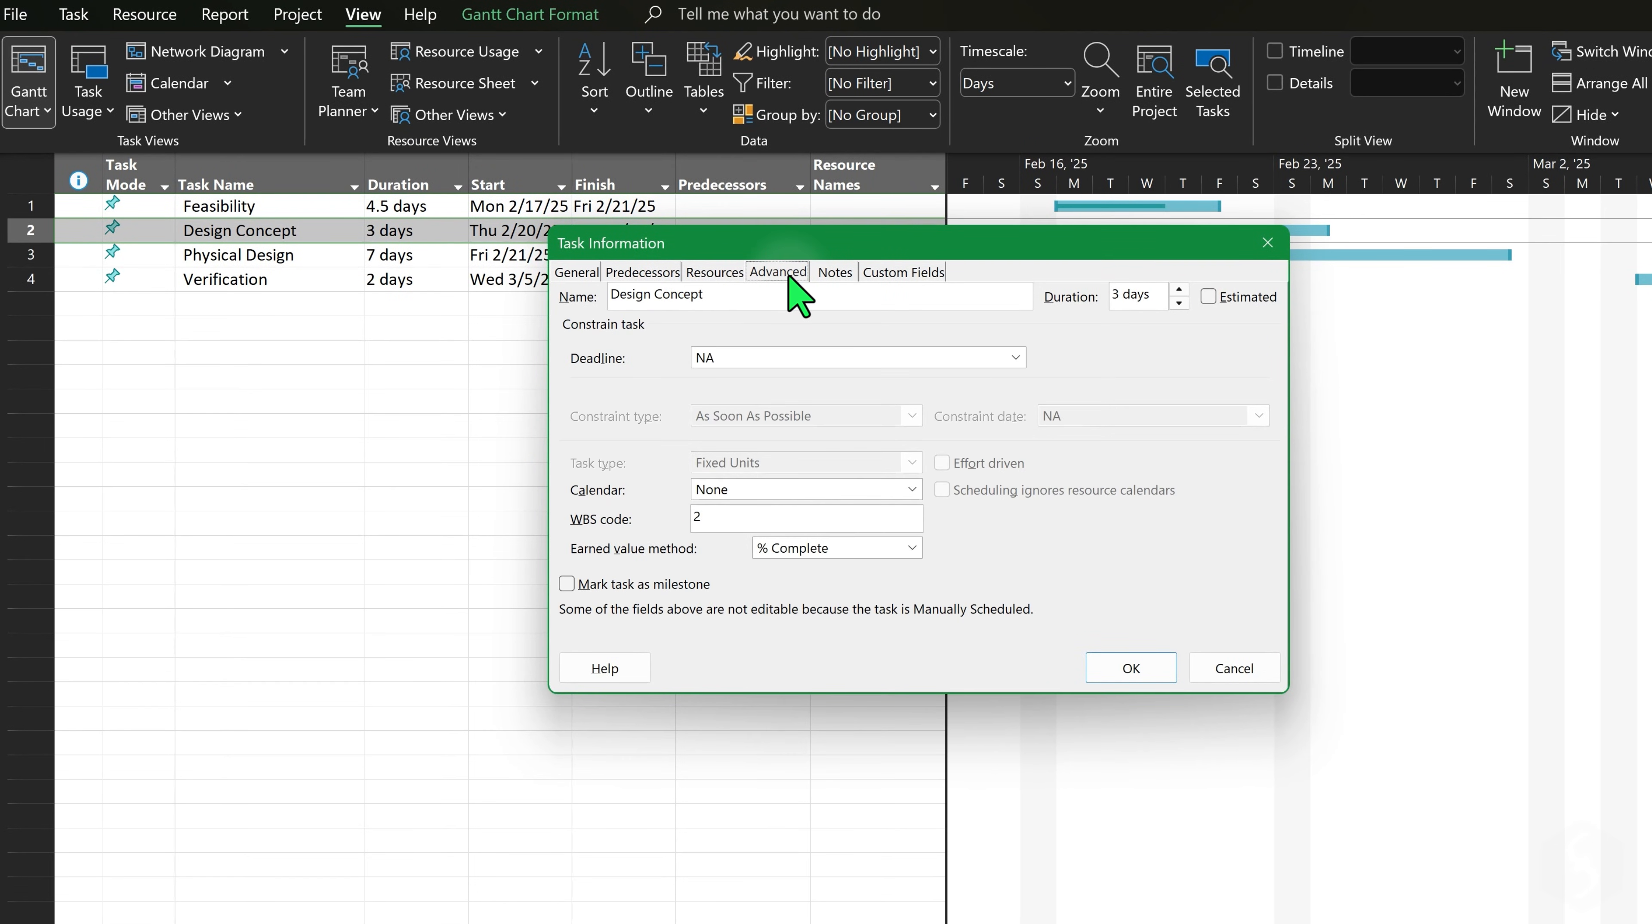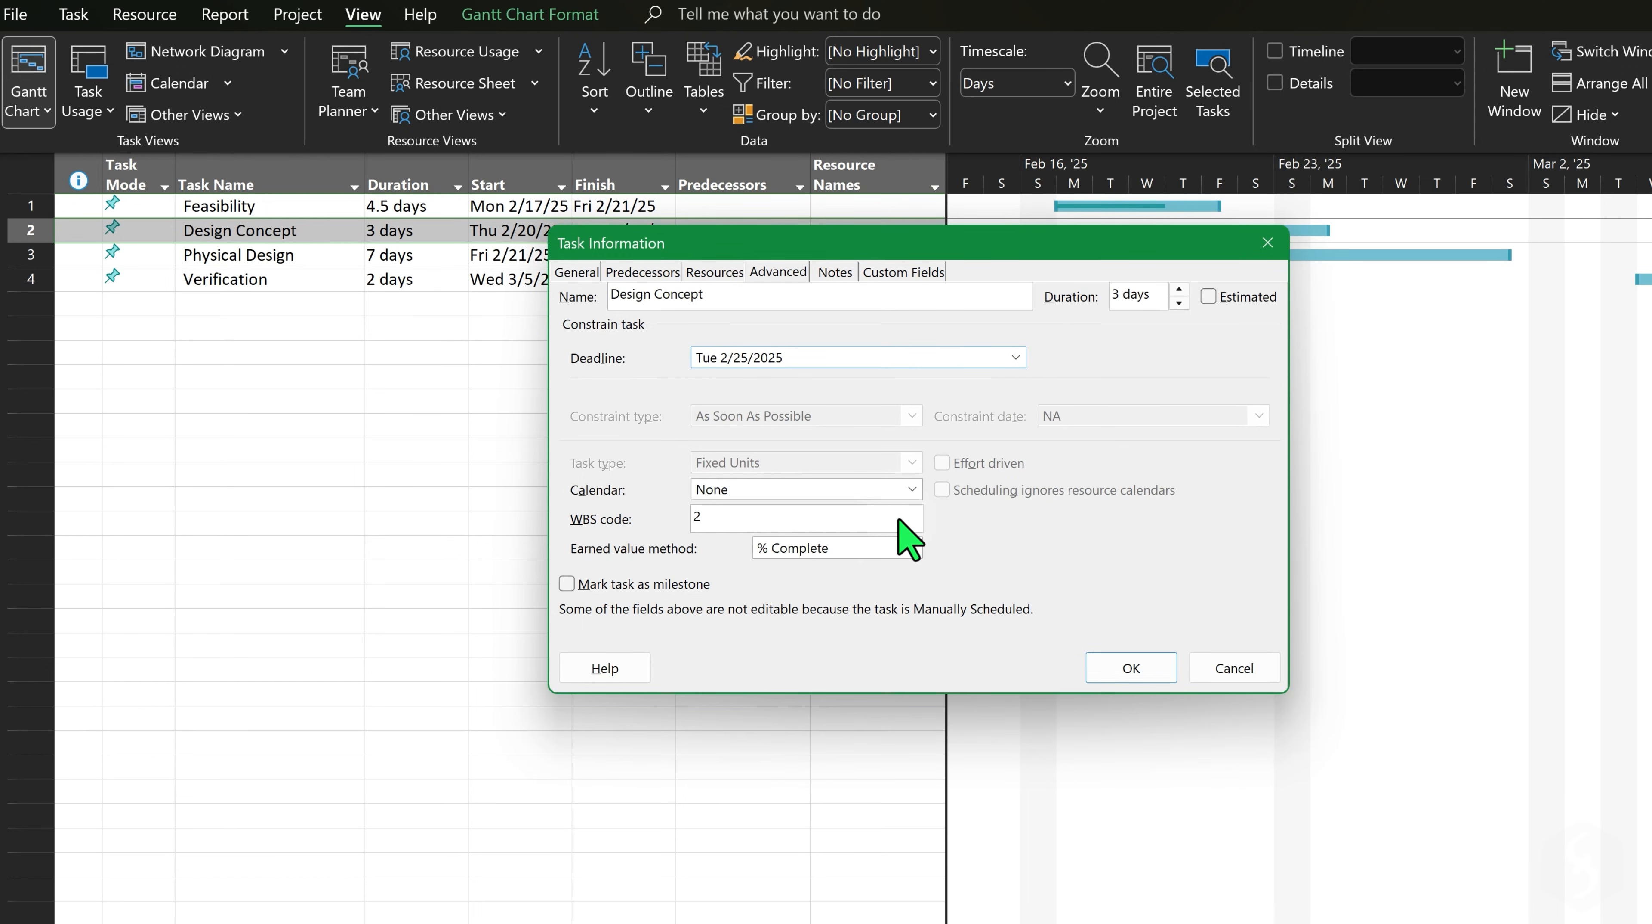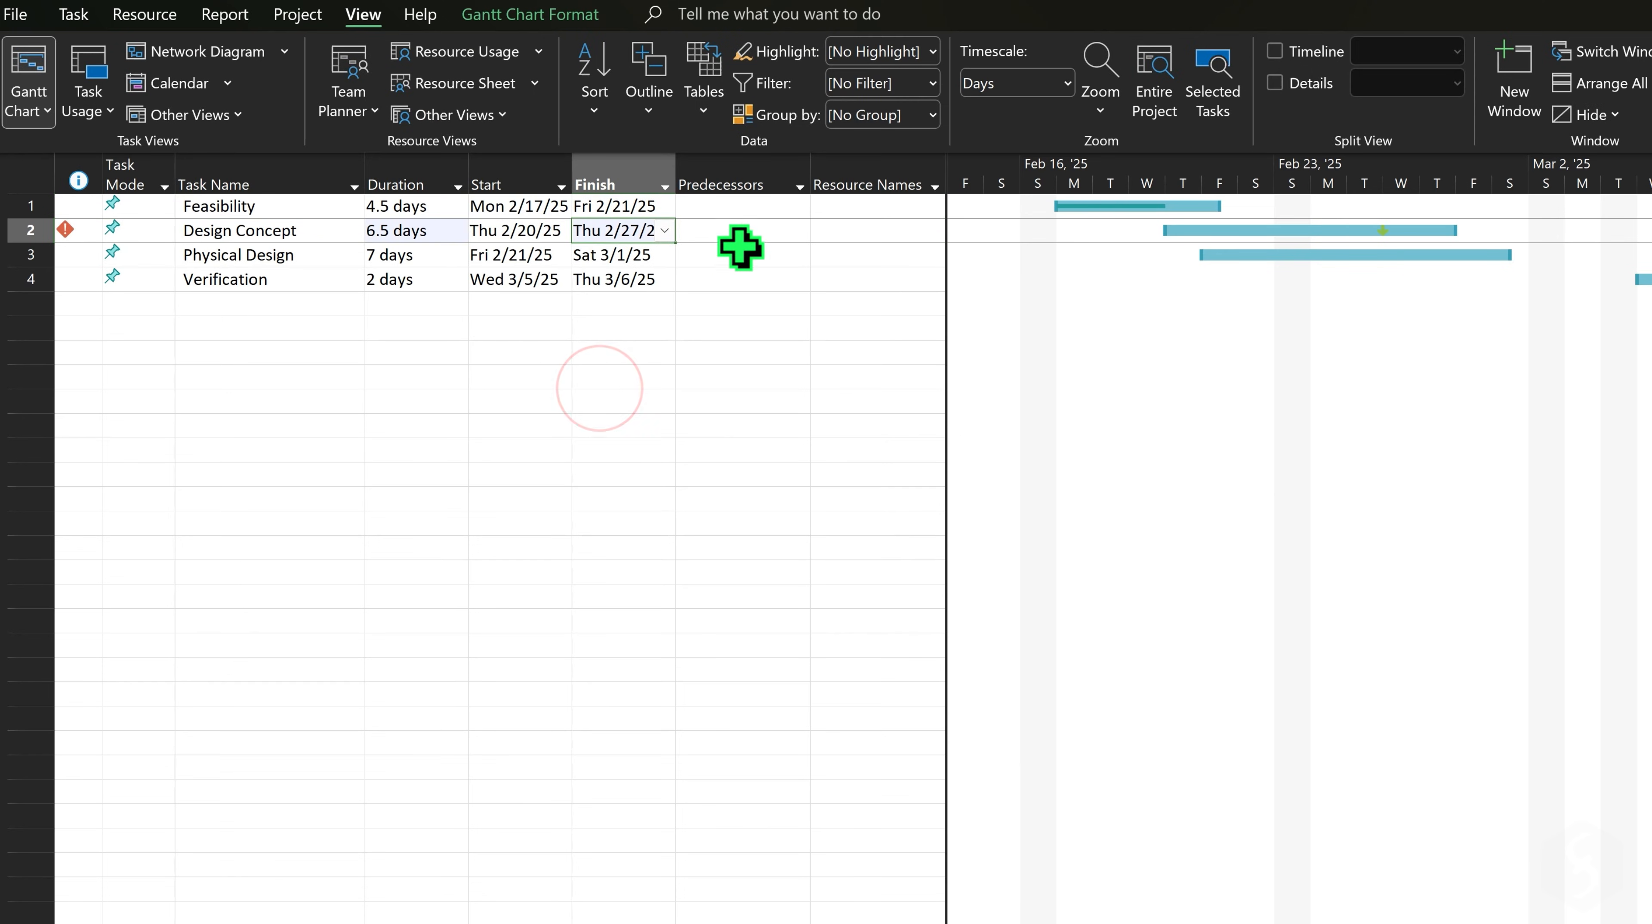Under Advanced, set any deadline for the task, shown as a green arrow on the timeline. If the task does not respect it, a red warning will appear on the left.